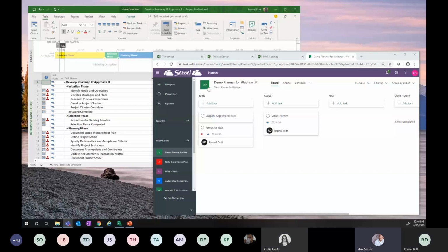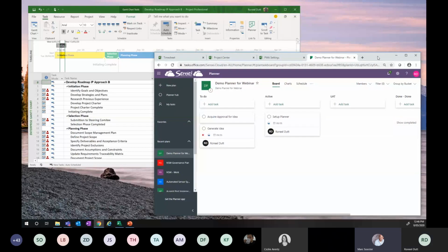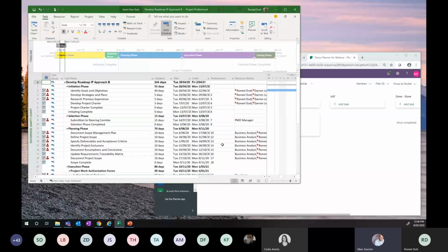You absolutely identified the shortcoming or the gap right now, and I would like to refer to, well, I'm using Microsoft words, of course, I would like to refer to that as the minimal viable product. So at this point in time, you can assign more than one resource to a task, but they will equally distribute the effort amongst both of these resources. So you cannot manage the assignment as you can in Project right now, but that will happen eventually.